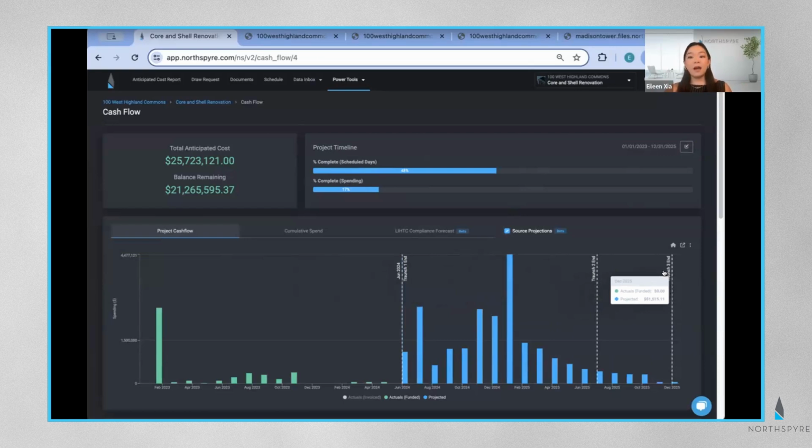With the Complex Capital add-on, you can now take advantage of your source projection feature to proactively monitor when you should expect to transition between sources and even identify early on if your costs are projected to exceed your funds. So on my project, it looks like my last tranche here ends before my project does.